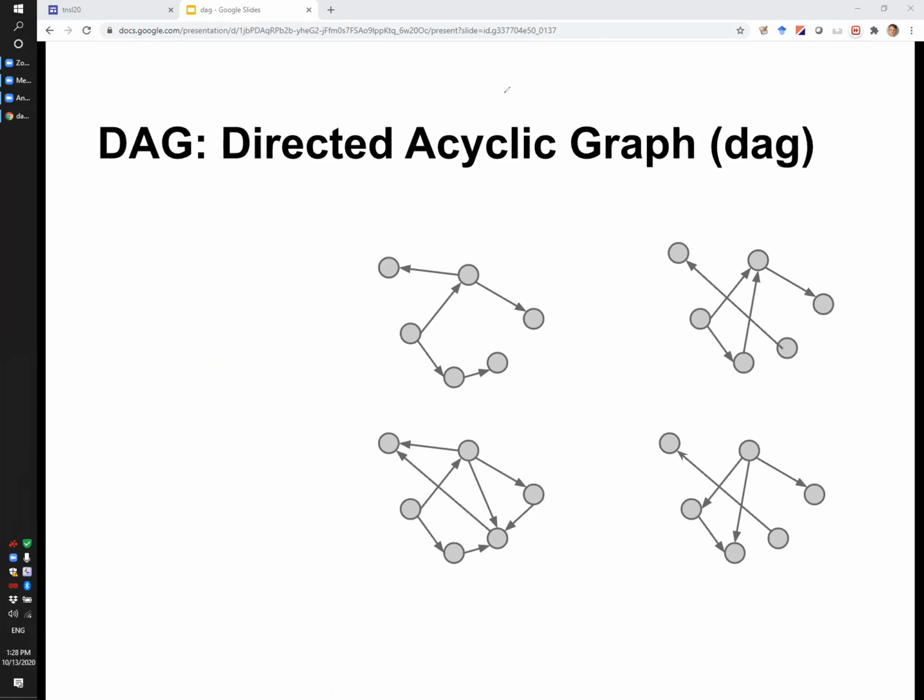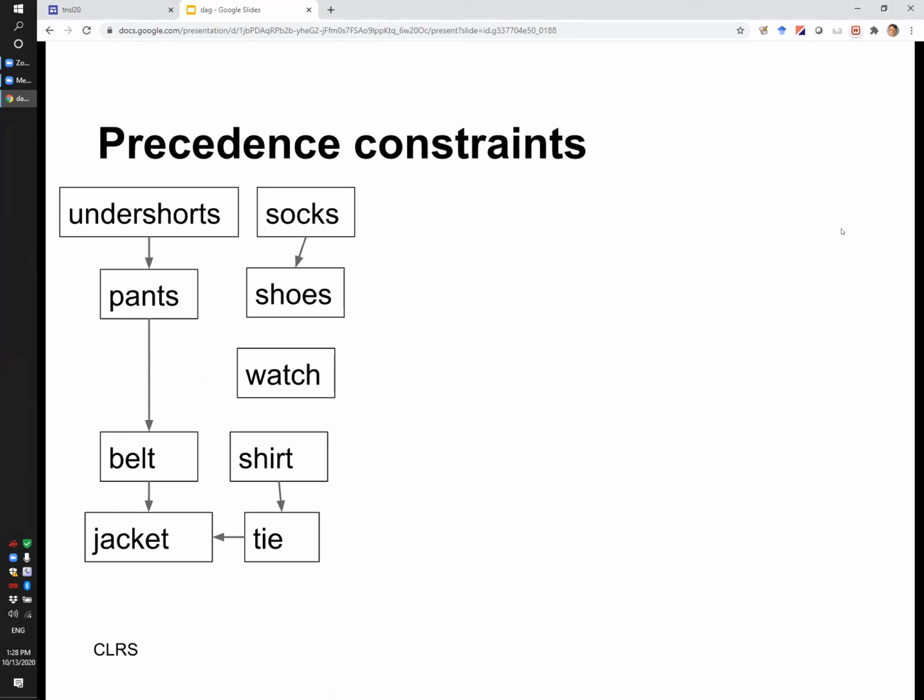Okay, so that's the definition. A directed acyclic graph is a directed graph which has no directed cycles. Again, as in many cases, the definition sounds more complicated than the notion itself: directed graphs with no cycles. Now, what are examples of directed acyclic graphs? You may think of many examples, and we will have some, but one particularly relevant example, relevant for logistics, is the graph of precedence constraints. You can have a project, and there are certain tasks that you have to execute in this project, and these tasks may form the nodes of your graph, and then the arrows or the edges of your graph will tell you that one of the tasks has to be done before another task is done.